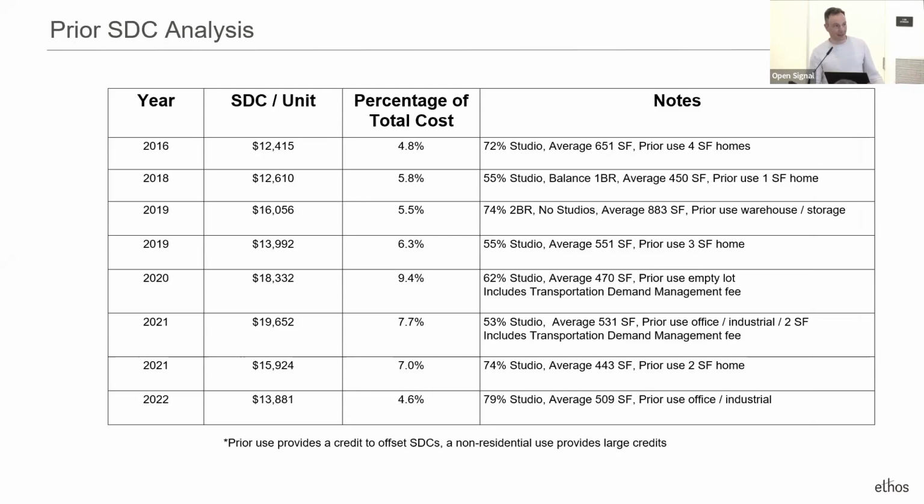The one thing that's tough when looking at information this granular is that what was on the site previously matters, because it is deducted from the SDCs that you're required to pay. So if there was a fourplex and we took it down to build 130 units, it is minus 4 units. And it's not exactly that, because it might have been bigger units that have more of a credit, and there may have been more hose bibs. It gets very, very granular.